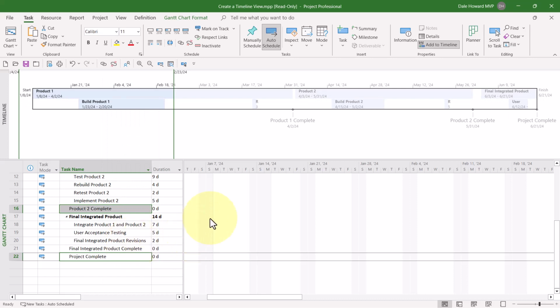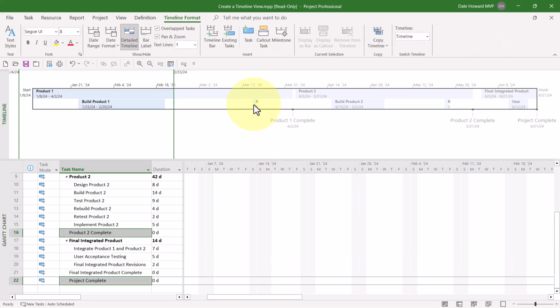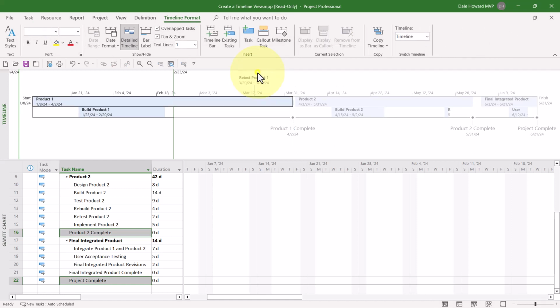One of the things that you may notice in the timeline view is that tasks with a very short duration also give you a very short little timeline bar where you cannot read the complete name of the task. If you ever run into this, like on the 3 tasks I'm showing here, what you can actually do is click the first bar, click and hold on it, drag it up on the screen, and when you see an outline appear, release the mouse button.